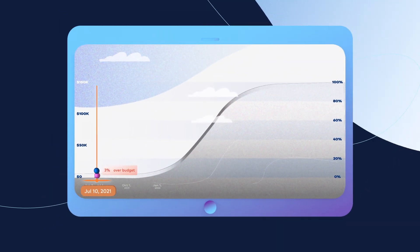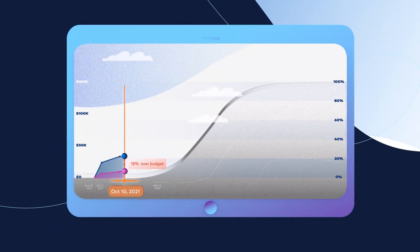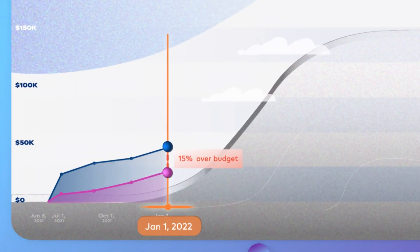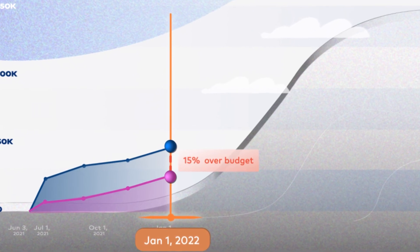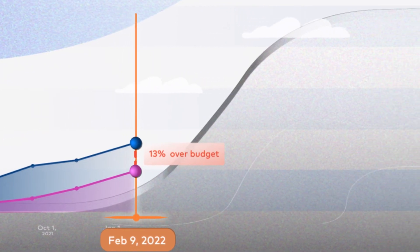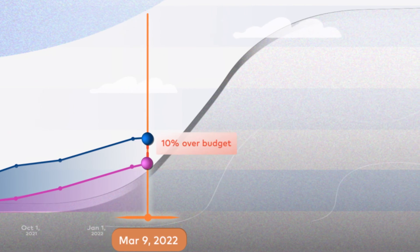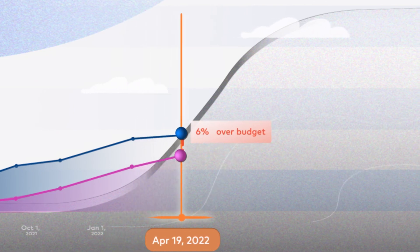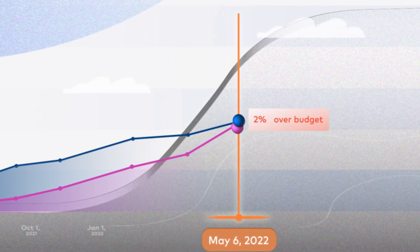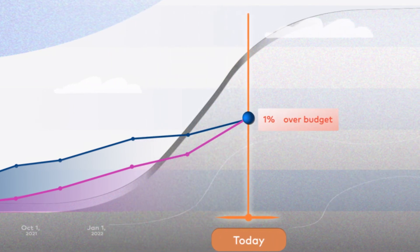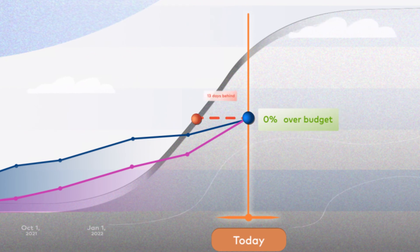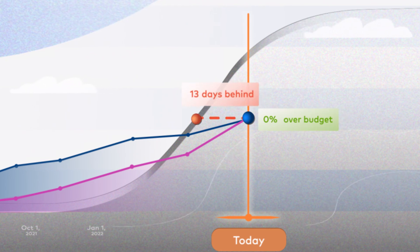We compare the money spent line to the work completed line to predict how much your project will end up costing. If today you've completed 40% of the work and spent 40% of the money, EVM predicts you'll finish right on budget, regardless of how much work you should have completed by now.